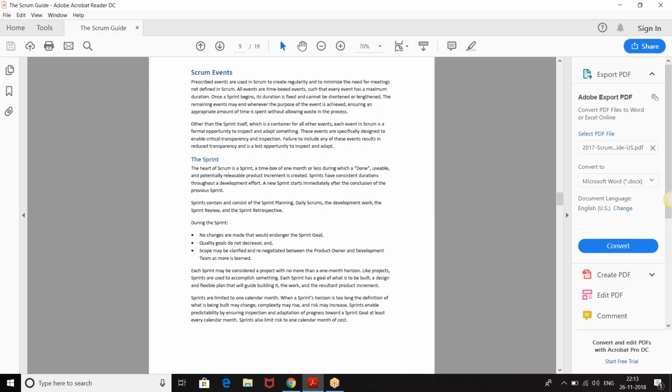So see, it's nothing about the right or wrong. See, practically, it is very difficult for you to have less than 3 people because when you have less than 3 people, what can you do? You at least need 1 or 2 people who can code, or one or two people who can test. So you obviously cannot have less than 3. It becomes too less of a size. It is the same case with more than 9. Then the team becomes too big.